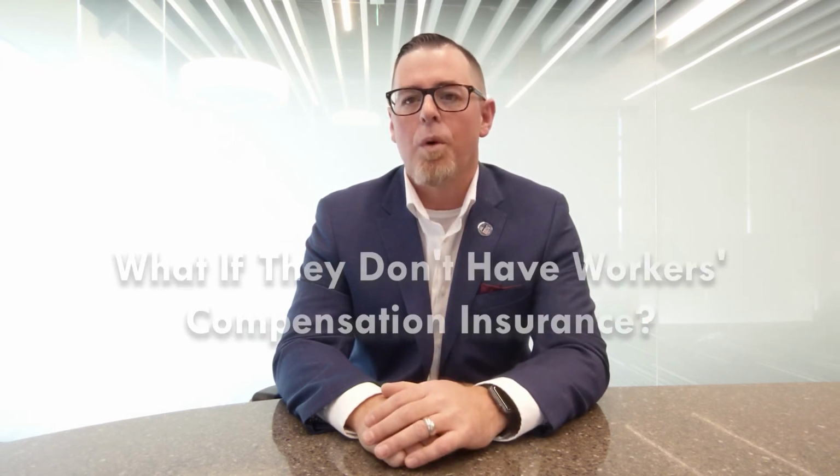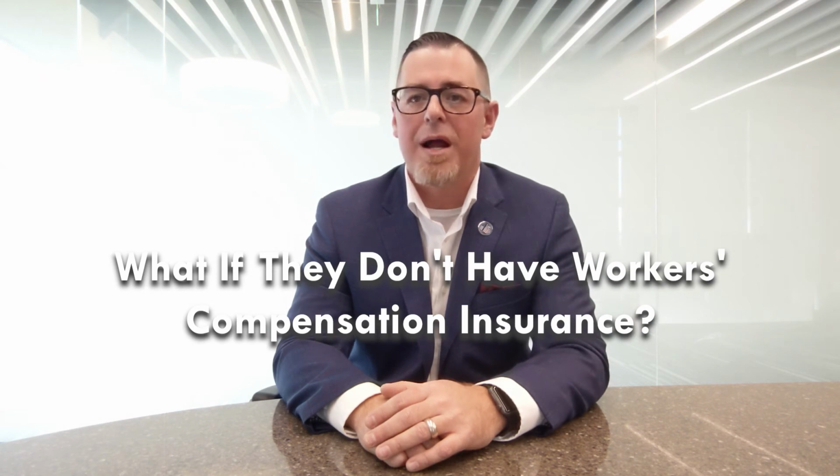But you may ask, what if they don't have work comp or they aren't required to carry it? Just remember, just because a subcontractor may be a sole proprietor, for example, and not required to carry work comp insurance in your state doesn't mean that you're off the hook. When they're doing work for you most of the time, the subcontractor becomes known as a statutory employee. The rules that apply to them individually do not always apply to another party hiring them to do the work. If your insurance company would have to pay a claim for any injuries the subcontractor may have, then that insurance company is allowed to collect the proper premium for it.